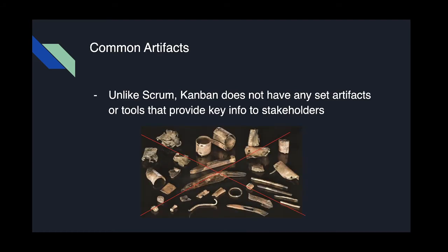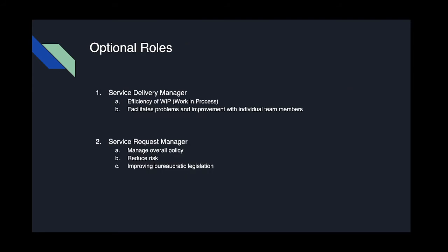In terms of common artifacts, Kanban does not really have any artifacts that are required or even optional. So with Scrum, you would have your product backlog, your sprint backlog, and increments, but you don't have that with Kanban. There are, however,